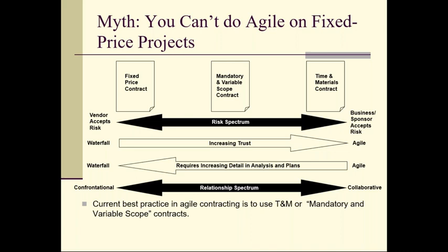Now, sometimes we've got to break those natural models, right? So sometimes we want time and materials contracts for a waterfall project or a fixed price Agile contract. Anytime you cross directions like that, that's what lawyers and contract specialists call a dysfunctional contracting model. The assignment of risk and responsibilities doesn't align with the power and control.